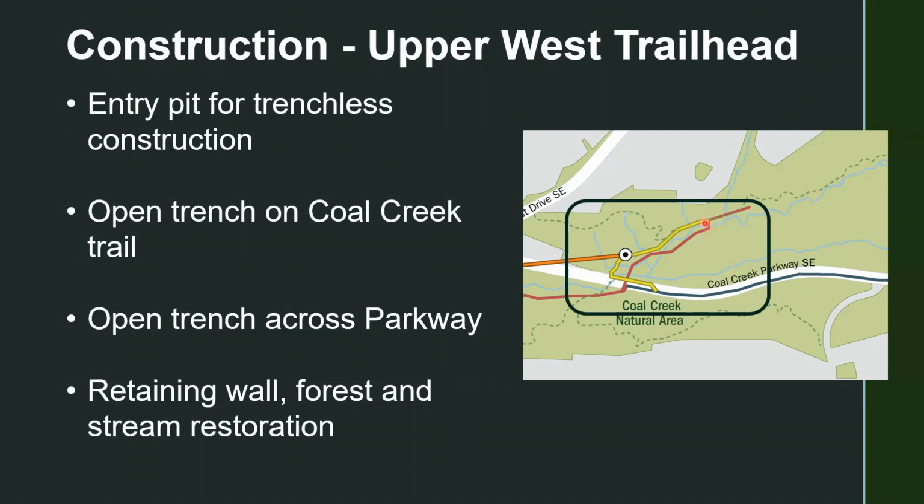This section in yellow up here is all open cut pipeline, which means a contractor will dig a trench, put a pipe in, and then backfill it. So it's not tunneled here, but the footprint for disruption is fairly limited. This other section right here, that's largely outside of the natural area, is the connection to the existing south trunk that remains in place, which Jacob talked about. And Ron, I think we have Jacob back. Okay, well, I'll stop talking and he can fill in the gaps then.